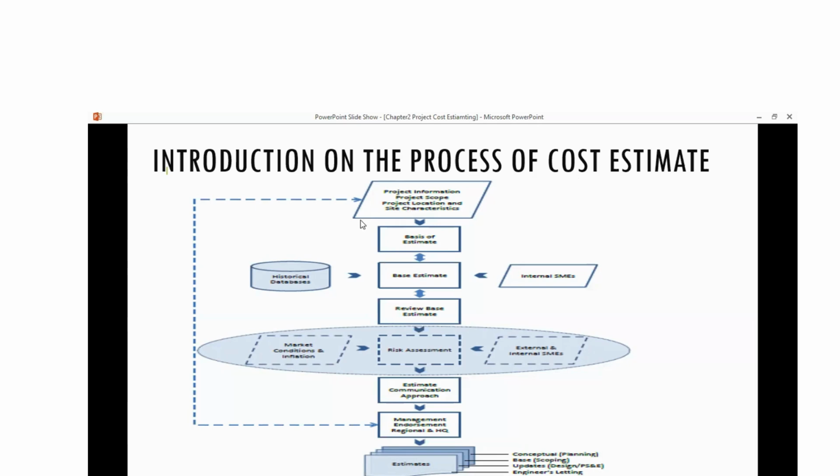And then I have to take the basis of those estimates, high level estimates, and they will be based on historical data. If I'm going through historical characteristics, I'm going through what we call top-down estimates. I am looking for historical projects similar to the project I'm going to run, benchmarking and measuring between them, and taking the differences. Or I might go through bottom-up estimation, which is to break down the estimates, including taking into account the SME, small and medium enterprise organization.